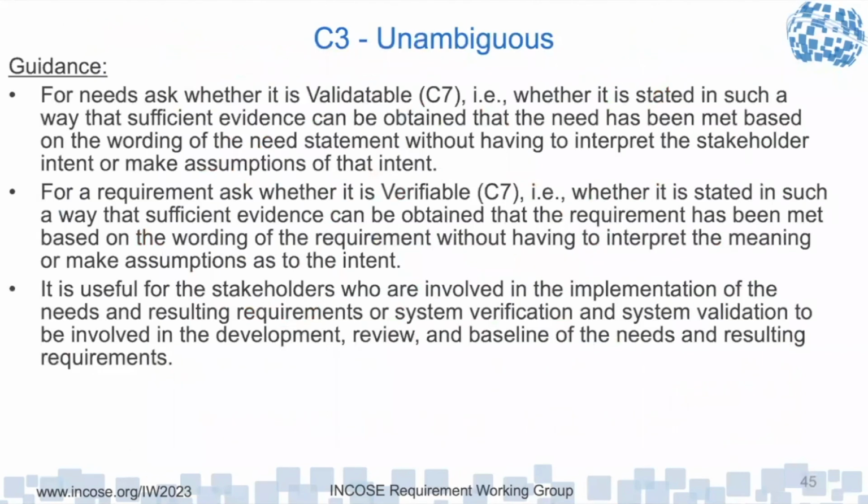Guidance for needs: ask whether it is validatable. Is it stated in such a way that sufficient evidence can be obtained that the need has been met based on the wording of the need statement, without having to interpret stakeholder intent or make assumptions? Ask whether it's verifiable, whether it's stated in such a way that sufficient evidence can be obtained that the requirement has been met based on the wording, and so on.